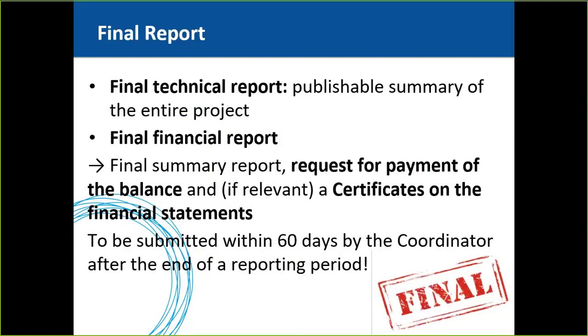The final financial report is the final summary financial statement that is automatically created by the system. It consolidates the data from all individual financial statements for all beneficiaries and linked third parties, if there are any taking part in the project, and it also consolidates all the reporting periods. That also constitutes the request for payment of the balance. And once again, it is the responsibility of the coordinator to submit the final report within 60 days after the end of the reporting period.